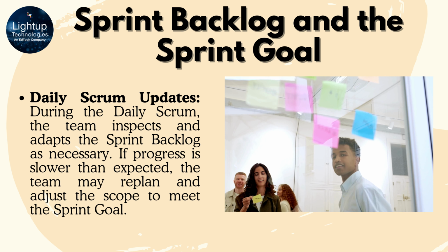Time-boxed sprint. The sprint backlog is time-boxed to the length of the sprint, typically 1 to 4 weeks. The Scrum team commits to completing the sprint backlog within the time box and is responsible for delivering a potentially shippable product increment at the end of the sprint.